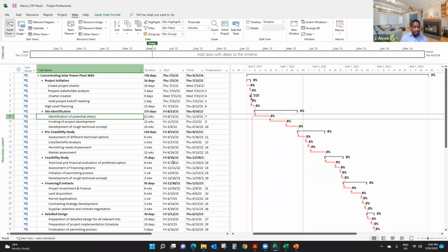If people have time. Another way to take a look at it is to say, well, since I'm at the beginning of planning, let me use the auto level feature. Now, fixing of allocations is called schedule leveling. Schedule leveling means that you're going to try to reduce the peaks and valleys.